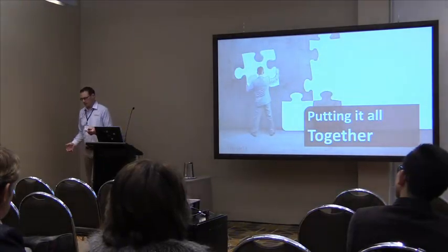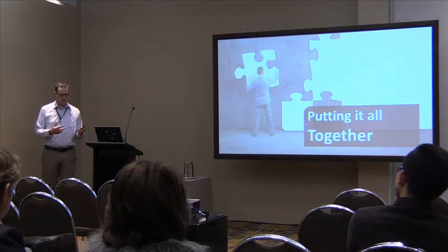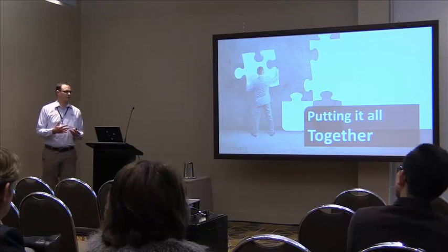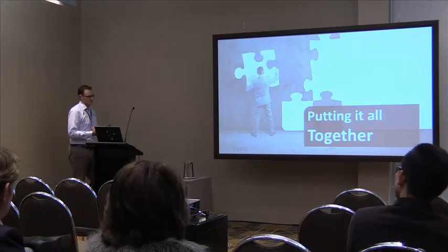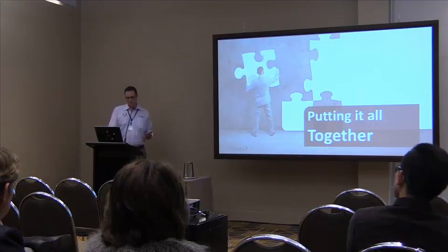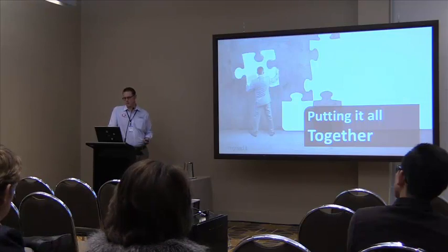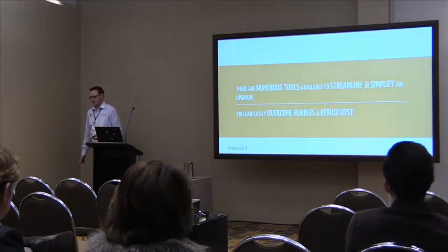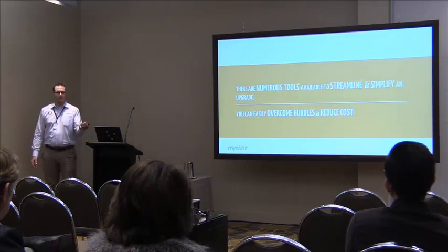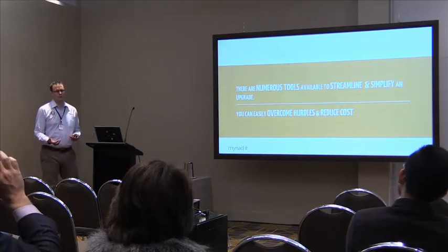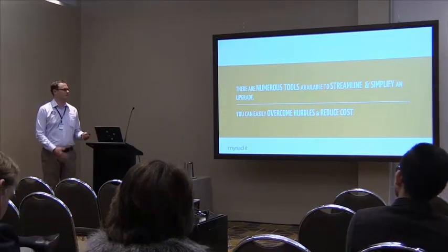So, taking all those 8 stages and bringing them all together, you can then look at everything that's fixed. You can look at the dynamic aspects as well. And in some places, you can fine-tune, do additional scoping at the start, and actually make them all fixed if you like. That's an option that is available. The only thing there is just paying a little bit of extra cost, an extra 10 days maybe at the beginning, will help you put things more at a fixed level, if that's how the business wants to do it.